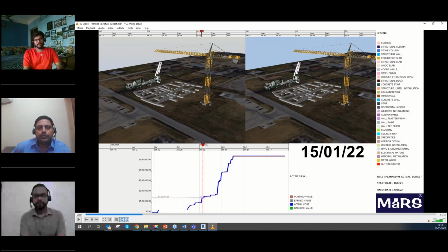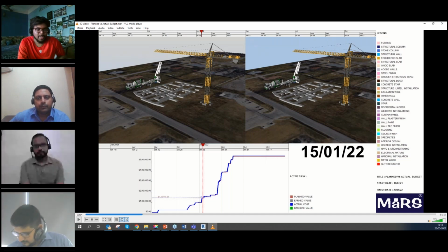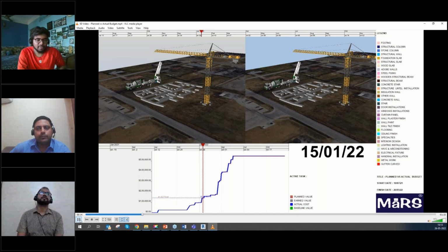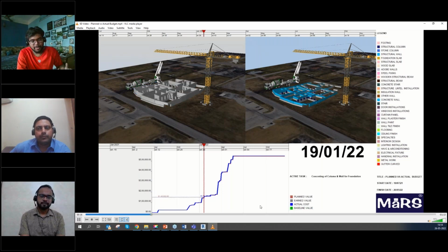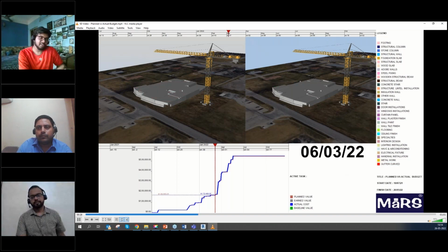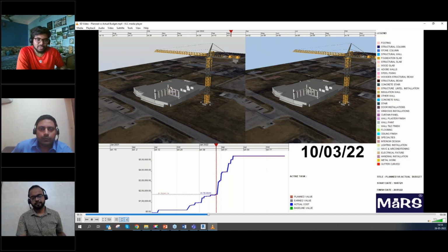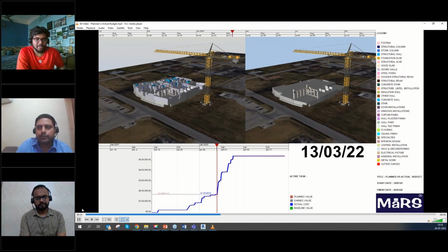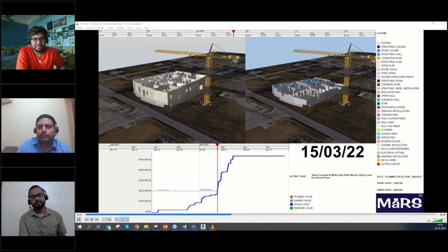So when they see the construction in parallel with the cost progress and cost budgeting, they can question better, as you were saying. From their experience they know a rule of thumb, that this much earned value should be there when we have done that much work. From there they can question better, or know what stage they are at. That's really a good example: in the initial approach, the client can get to know the progression versus the budget.